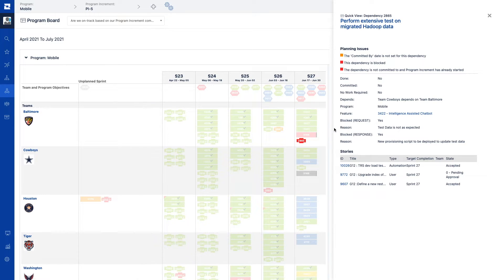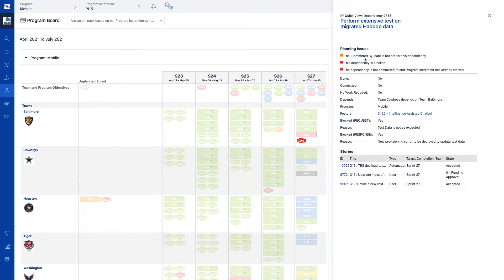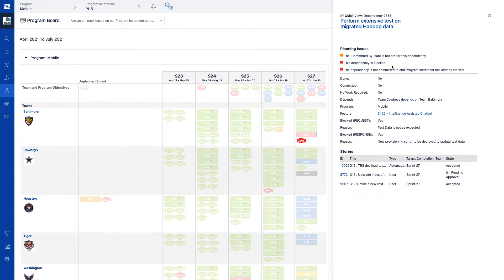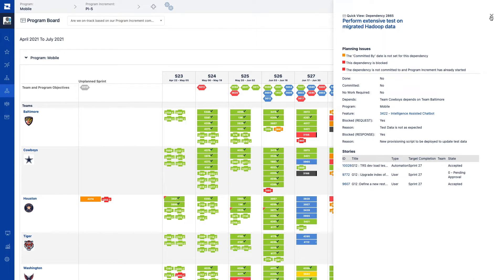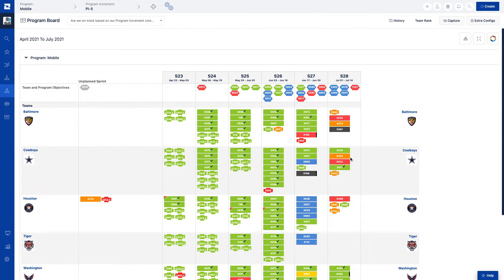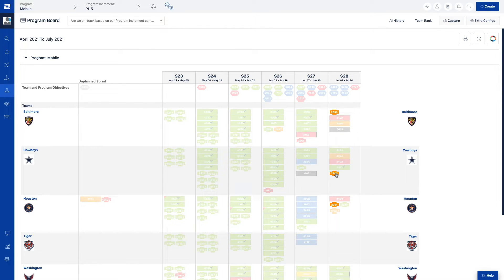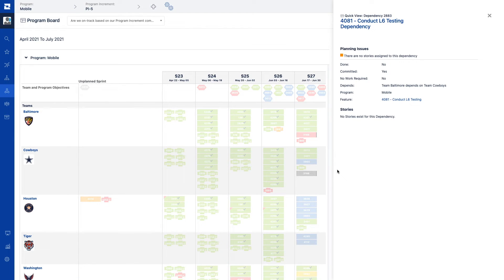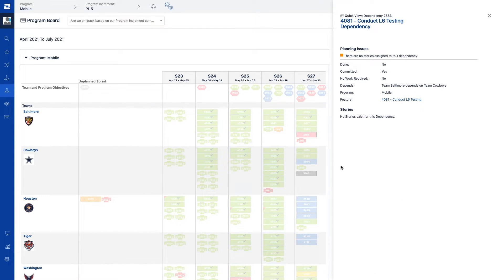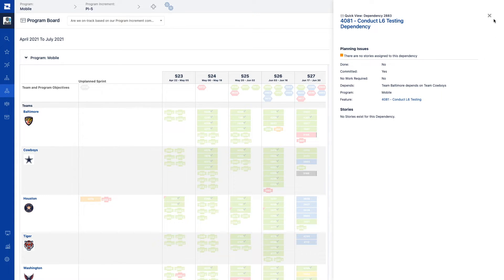and when the work needs to be completed. If there are issues with a dependency, including things like the dependency is blocked, no commitment has been received by the requested team, or the dependency is still open and a due date has passed, the program board will display planning issues, which will help ensure the proper actions are taken so there are no disruptions to the flow of work.